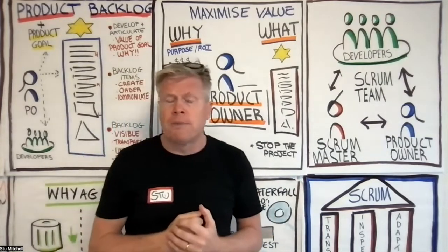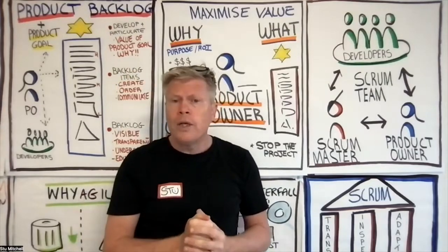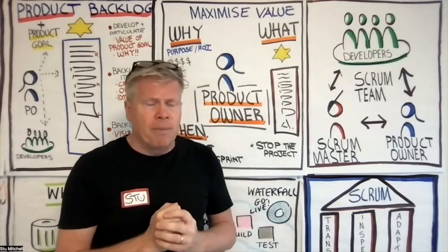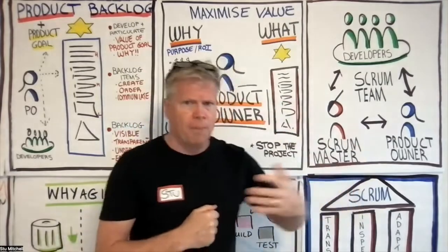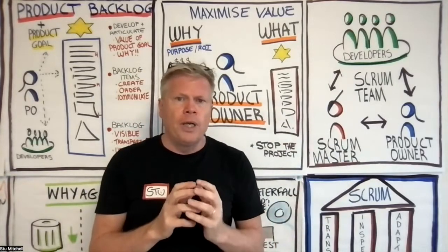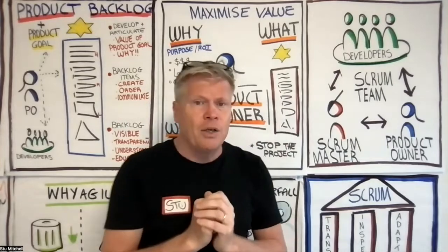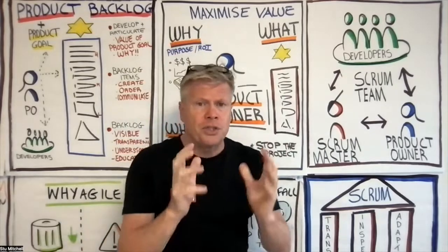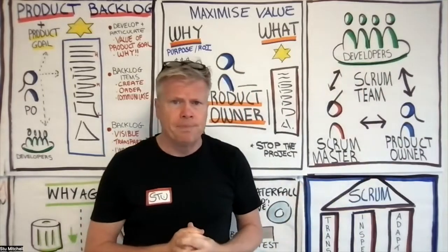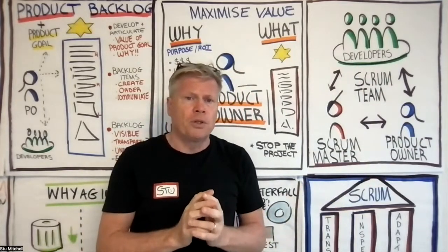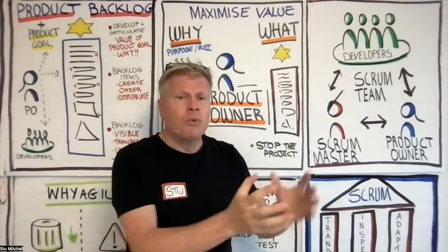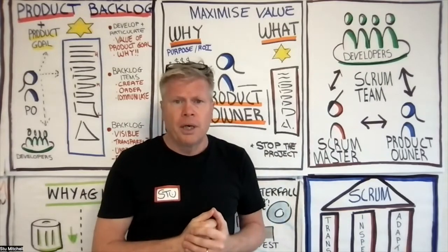The final thing that she's responsible for is when to stop. When do we stop this product? It's again one of the hard decisions that I had to make, because it's very easy to do another couple of weeks, another little function, another feature. But at some point, that perceived value is not value at all. And it's certainly not worth the very expensive resources that we're throwing at it. So part of the job of being a product owner is when to say, I think that's enough. We now stop, and we'll redirect the resources to another project.